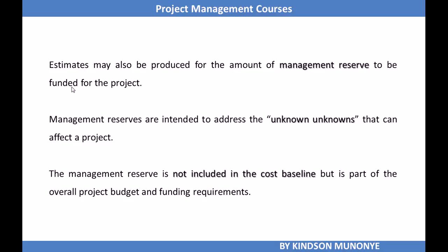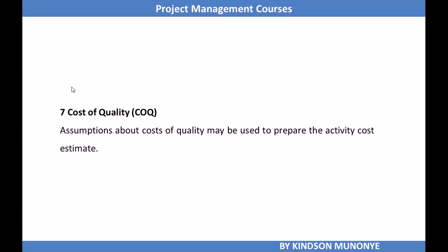We also have, under the reserve analysis, an estimate for management reserve. Management reserve is associated with unknown unknowns, risks that have not been identified and nothing has been planned for. This is not part of the cost baseline but part of the overall budget of the project.